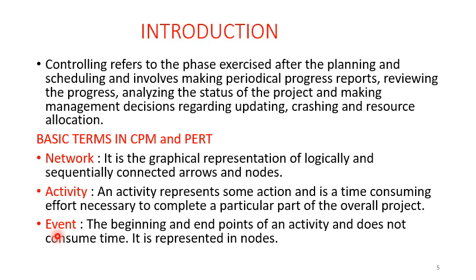Each activity here represents some action or task and is always time consuming. For example, activity 1 may take 10 days or 10 hours, and activity 2 may take only 2 hours. But for activity 2 to start, activity 1 should be complete. Activity 2 can start only if activity 1 is complete.